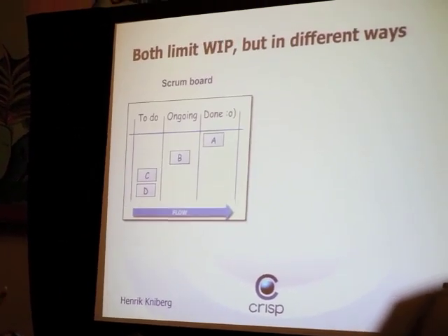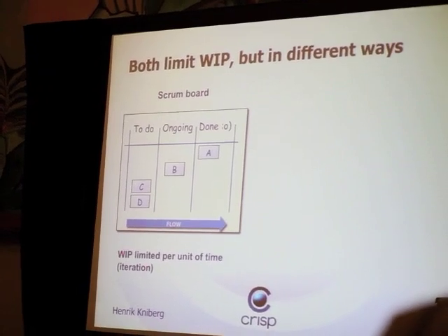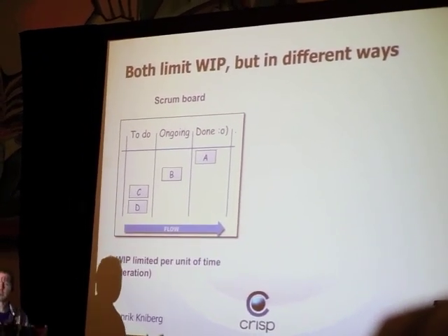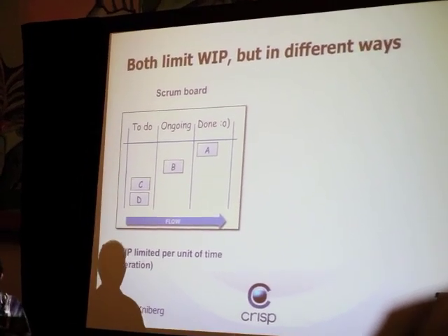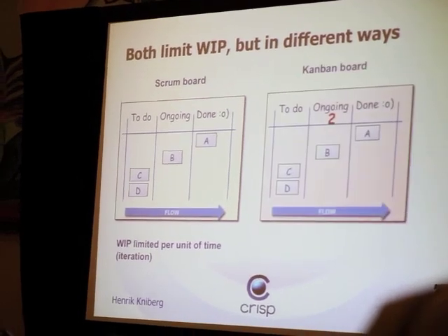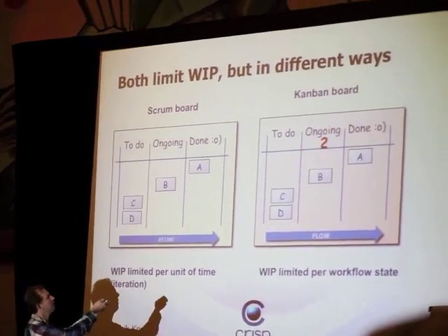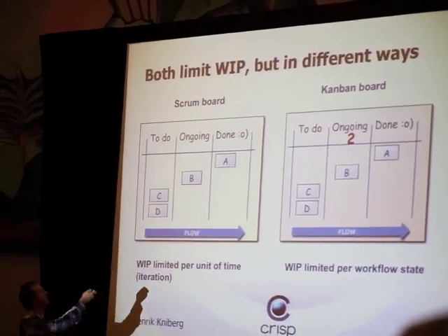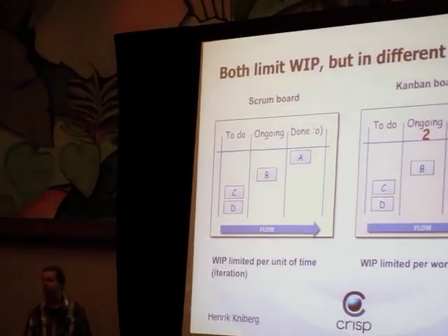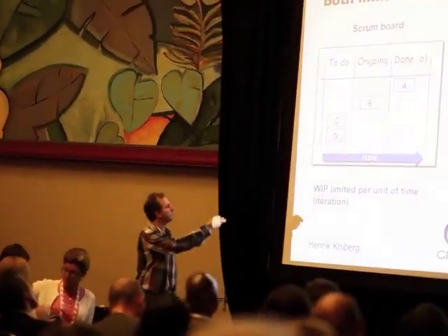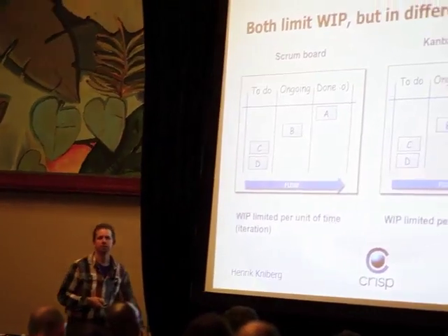So in summary, Scrum does limit work in progress indirectly through velocity. You know, we've measured our velocities, normally 20 to 30, so that's our limit. We don't bring in more than 20 or 30. So it's a limit in terms of time per sprint. In Kanban, it's not a unit per time, it's more per column. Typically per column, right? But some put a limit on a per board level, etc. So be imaginative there. Find some way to limit your work in progress. This is a common way, but it's not the only way.